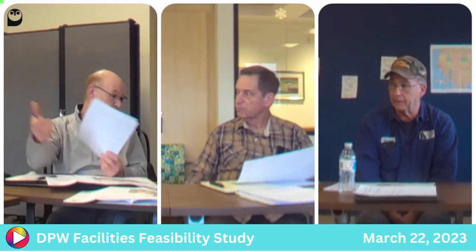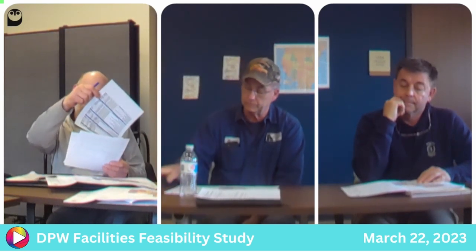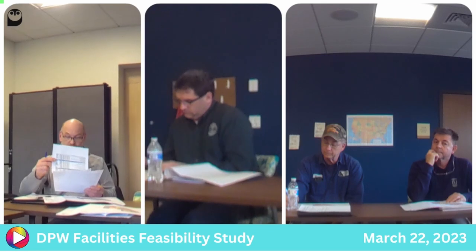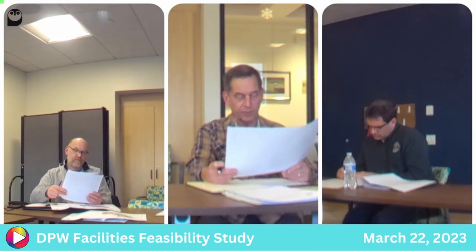Sure. We have a lot of historical numbers, so we're basically using cost per square foot for different portions of the building. Obviously, the vehicle garage is the least expensive, and it's also the biggest, so that does impact the whole project. But over as a total construction, we are looking at almost $500 a square foot, so it's about $22 million total construction. So that ends up being a 27 plus or minus million dollar project cost when you add in engineering and soft costs.